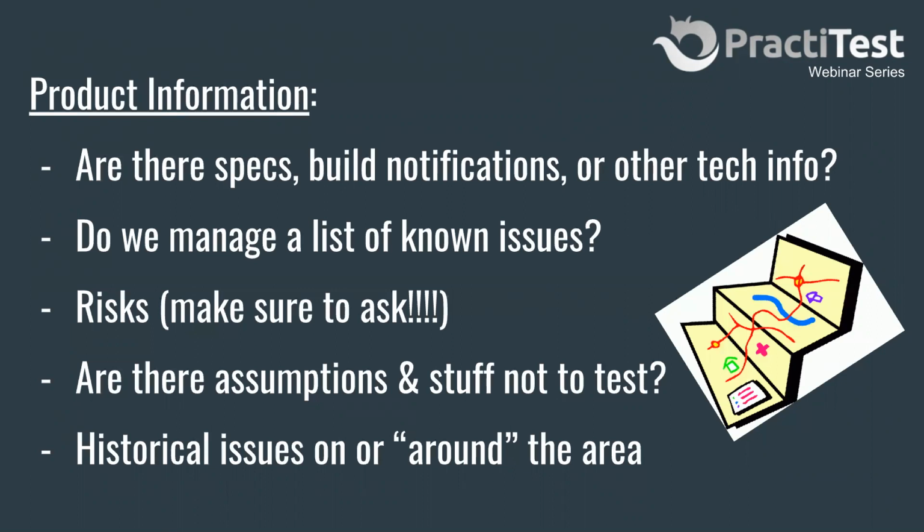So by risk, I mean, go to your developers, go to people who have access to information and say, hey guys, where should I be looking for issues here? Okay, and go ahead and ask. Okay, risks are something that should be documented, that is something that is usually known. And so you can go ahead and ask about those risks to your technical team. It's something as simple as say, hey, you know what? I'm starting to test this and this feature. What do you suggest that I actually start testing with? Okay, where are those risks that you think that I should actually work with? And you'll be amazed that many of the developers and technical staff are going to come forward and tell you all the stuff that you should be starting from, and those are your risks.